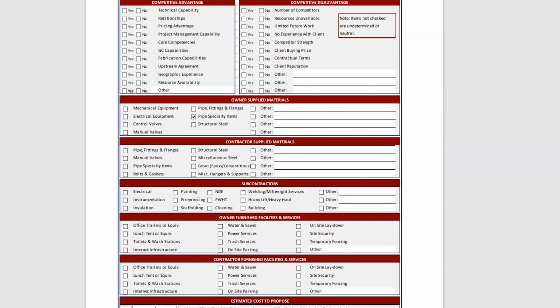At Fluor, at Black and Veatch, at Brown and Root, we built much more complex, all-inclusive crews, where the average wage rate that we applied to our mechanical would include millwrights, iron workers for rigging, a crane operator, a pipe fitter, a couple of laborers, and the millwrights might have 1 apprentice and 1 journeyman. So it's a real blend. We might even have a little bit of truck time in there, depending upon where we had the handoff between indirect and direct craft.